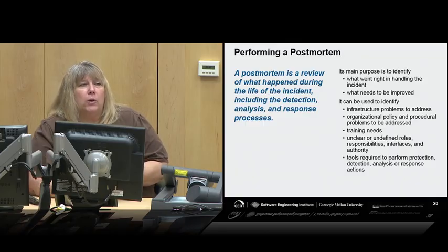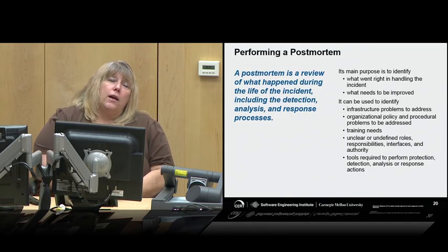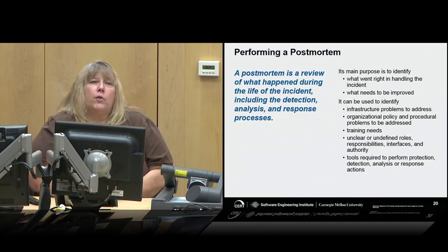It could include when things have gone really bad and the incident took a very long time to resolve, when there were complaints about how it was handled, where the processes broke down. It can also be when it involved a high-level critical asset. It can also be a post-mortem if there's a certain amount of damage done or a certain amount of financial loss that occurred. So think about when you would perform the post-mortem.